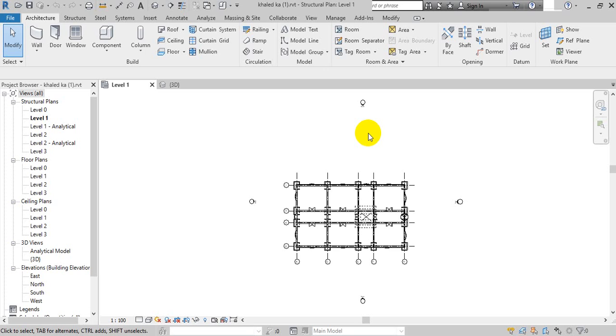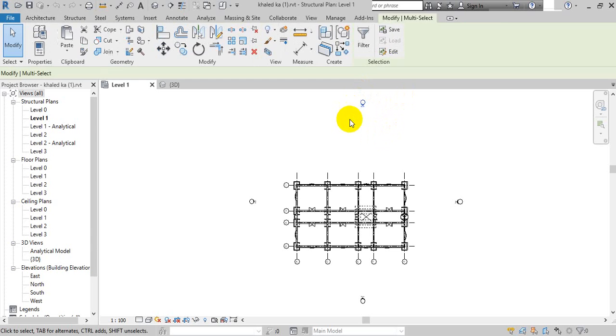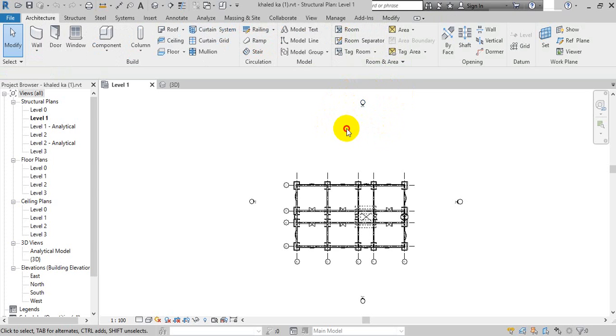For that, Navisworks shows the building as in real life, and we can figure it out from Navisworks. As we said, if we have a pipe across a beam, that is a problem, and we want to find a solution for it, either by reducing the dimension of the beam, or we can change the direction of the pipe. That's one method, and we can find it early, before we start the project.